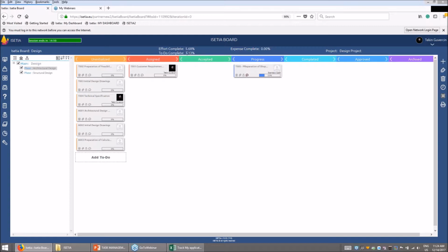What does it mean, to do completed? There are 8 tasks, and you can see that this is the percent complete of 25 for all of them. The factor is 1, but effort is, this is 50 hours, this is 10 hours, this is 20 hours. Effort is calculated by weightage factor for the man hours.